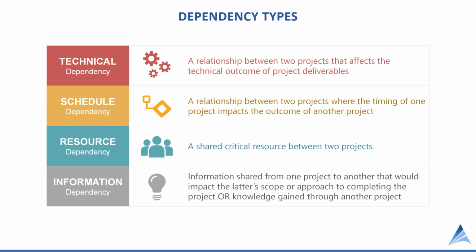A schedule dependency comes into play when there's a timing factor. Now, the technical dependency and the schedule dependency could be very similar. A key distinction is that there's an actual deliverable that's being shared to another project in order for that second project to complete. That's the technical dependency. Schedule dependency is more of a synchronization. We need to synchronize our deliverables so that we can be successful. So one classic example of a schedule-related dependency would be